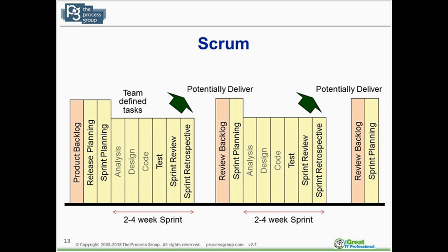Well, one popular way is incremental, or through an agile process like Scrum, where we have a backlog of requirements. They are collected. We maybe pick out a 2-week cycle for the first set of features, or first feature, for a 2-week increment. We plan it, we do the work, we test it, we do a demo to get feedback, which is good, and then we do a retrospective or lessons learned activity to figure out how well that sprint went.